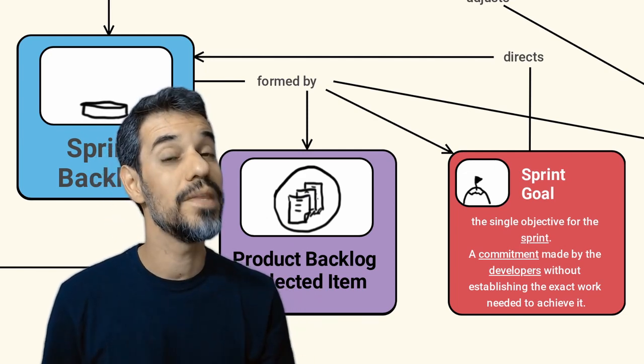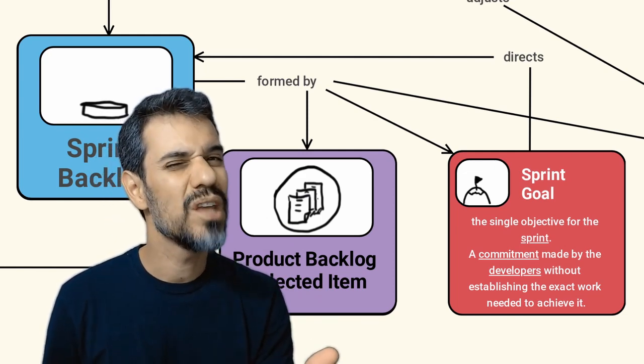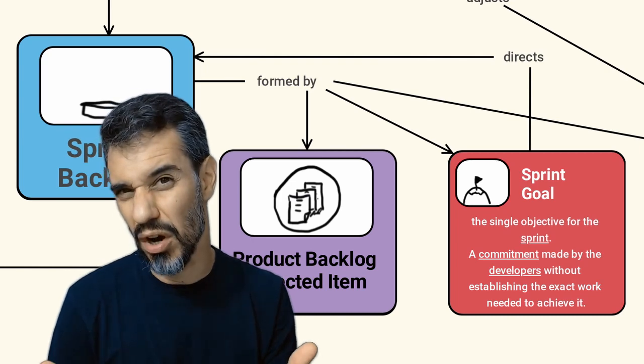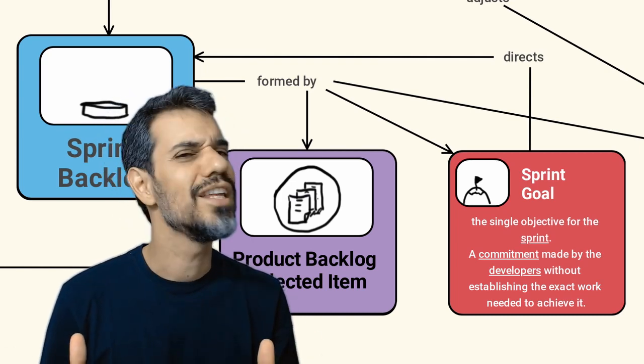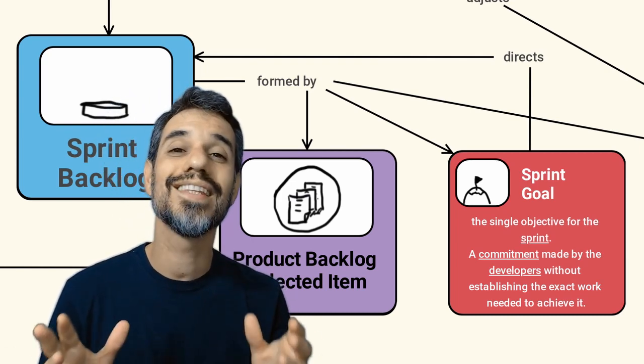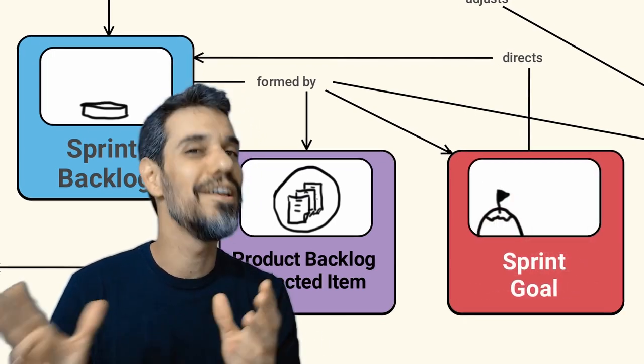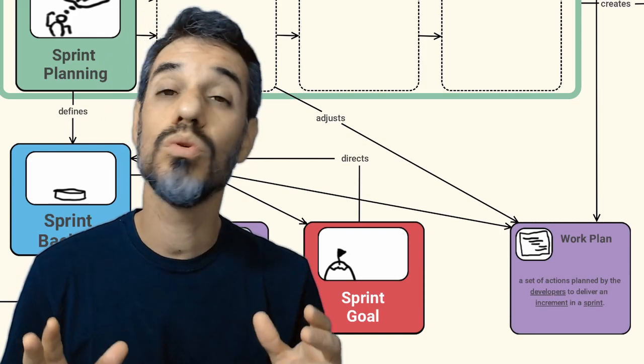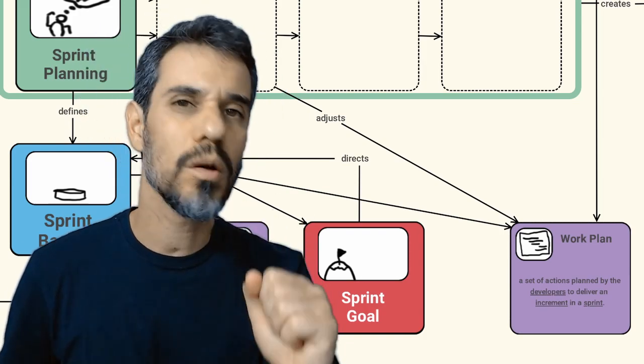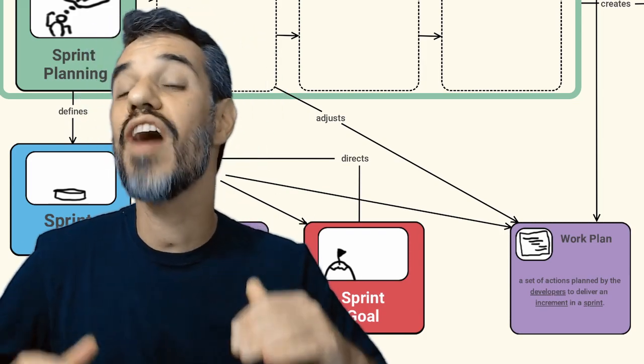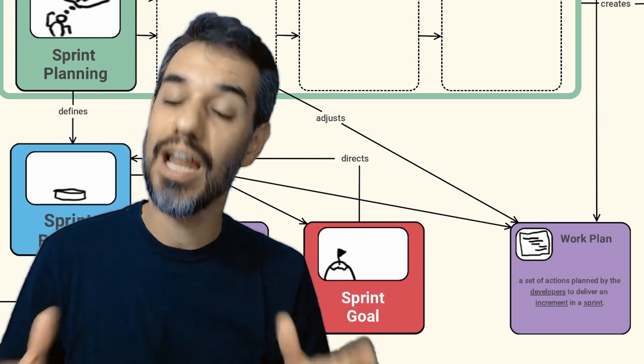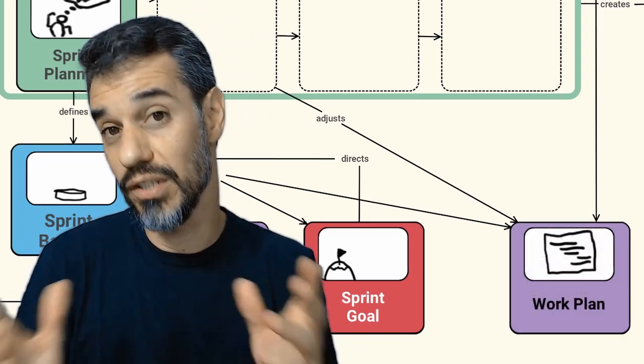The goal should describe the outcomes of the sprint without describing the outputs of it. In other words, it should not describe what the team must do, but what the team must deliver. And we may also find in a sprint backlog a work plan. The plan is the set of actions planned by the developers to be done during the sprint.